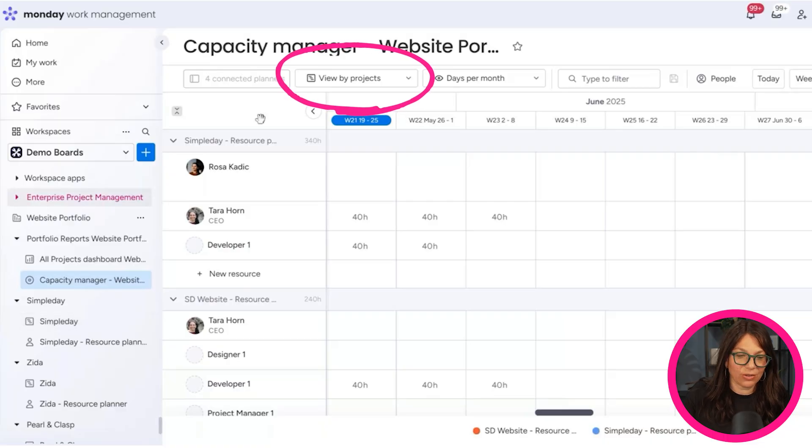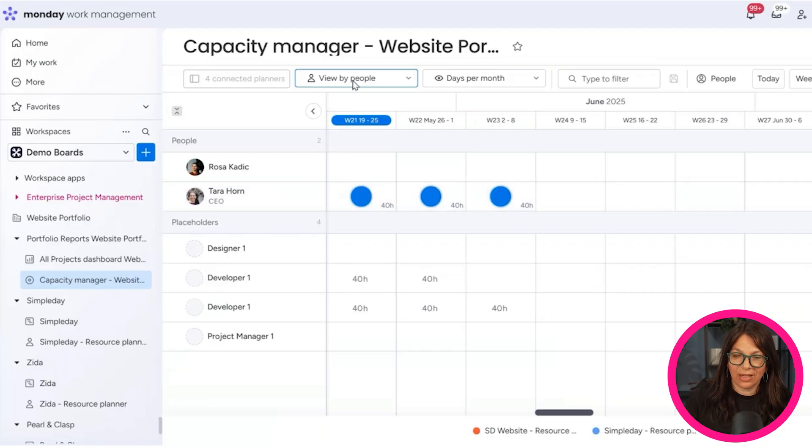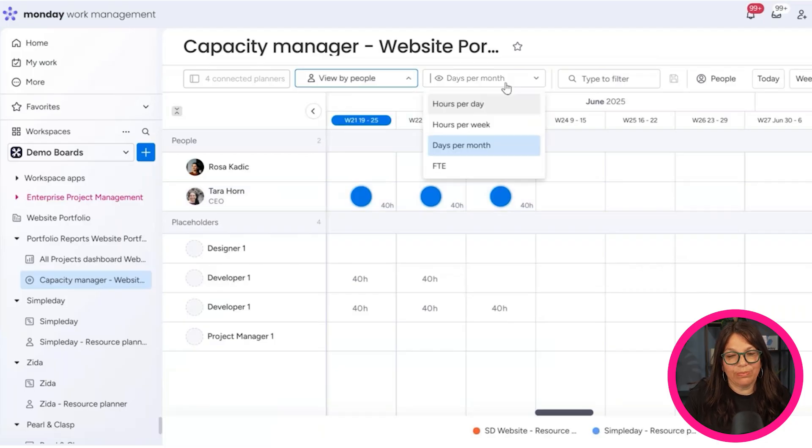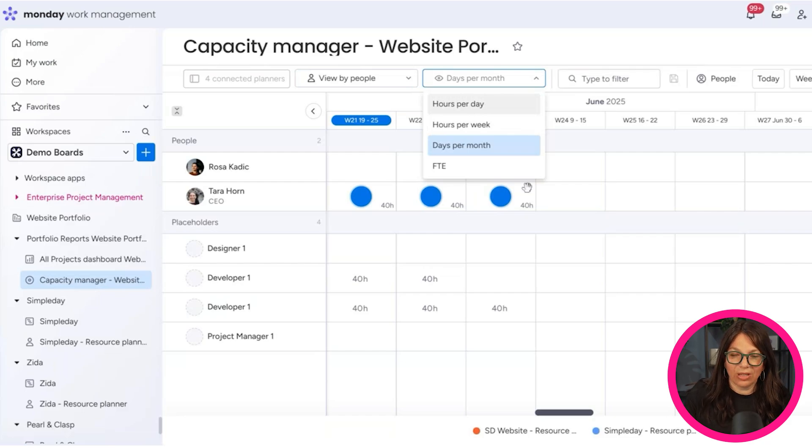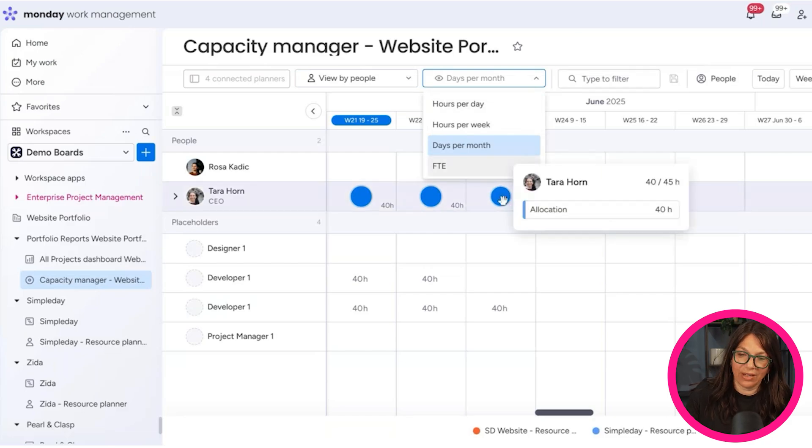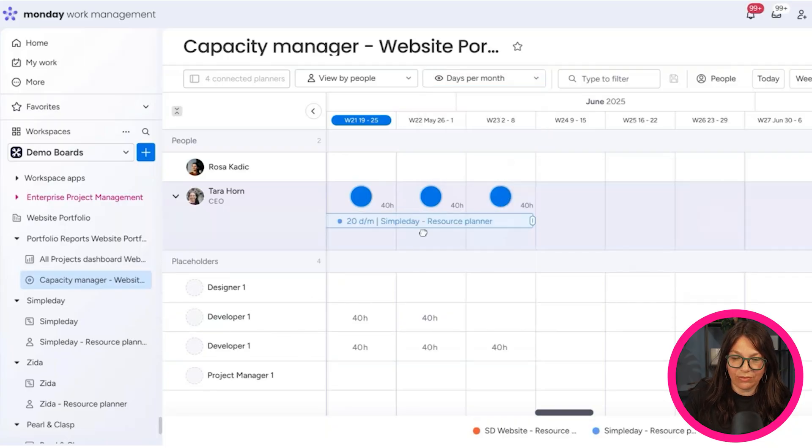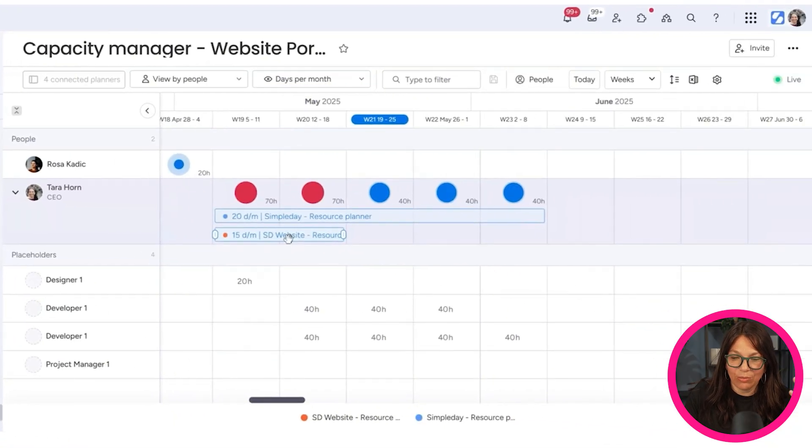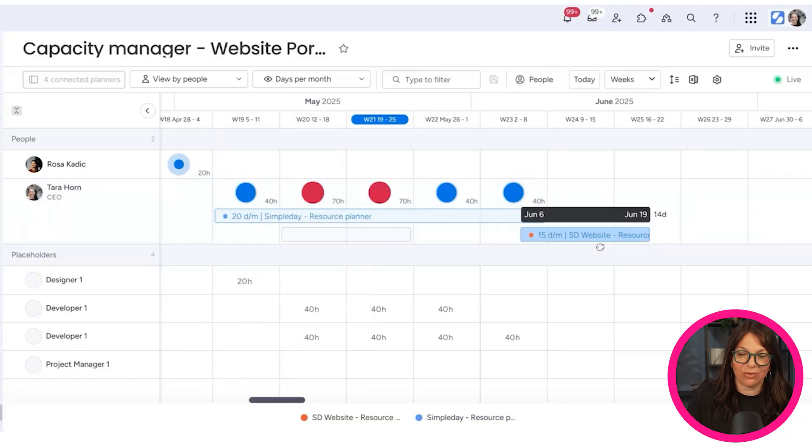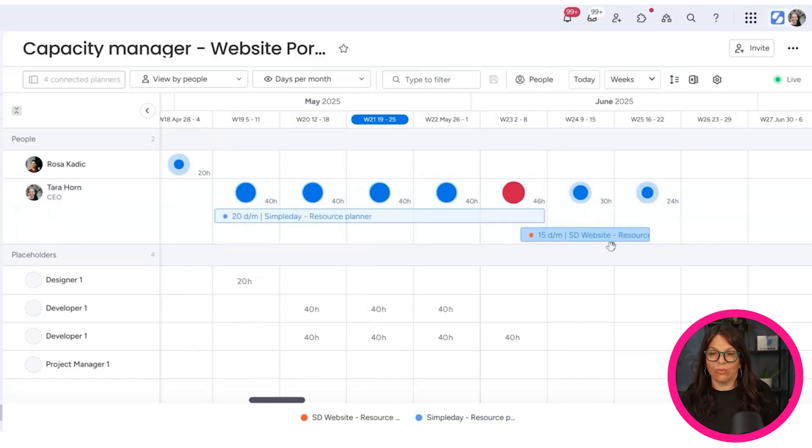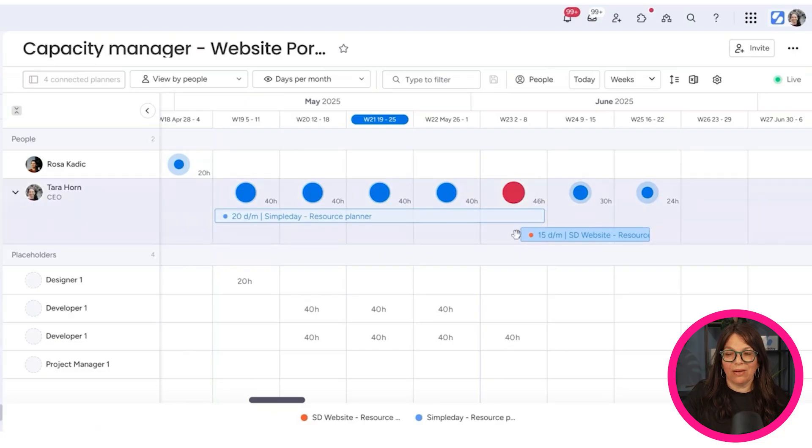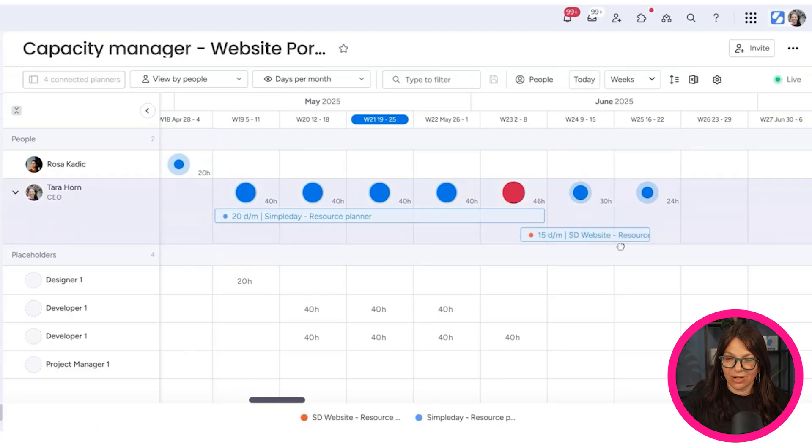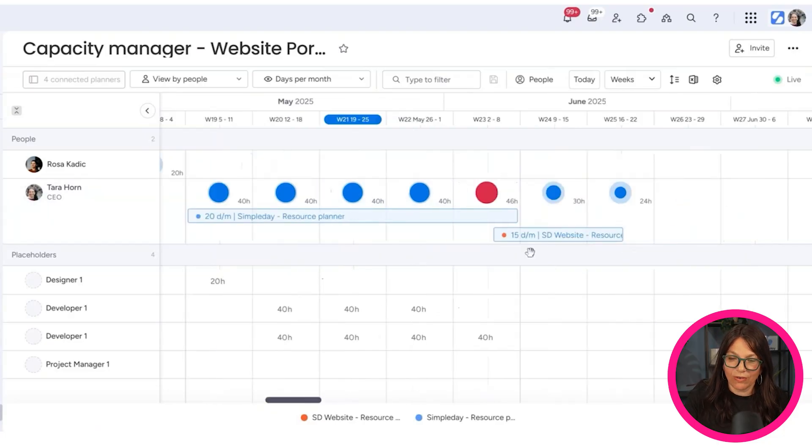And then I have different views. I could view by person. So here you could see how busy I am over these days. You can view it by project. Again, you can do hours per day, hours per week. There's a lot of things that you can come in here and you can see how everything's going. Now let's just say I realize I have too much. So I actually can just move something over. So now let's move me here. And now all of a sudden, wow, Tara has time in her schedule. Once we move this project over, we can see, okay, now this is a workload that's manageable. And this is for all of your projects.